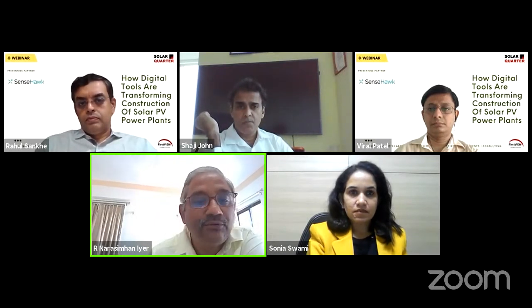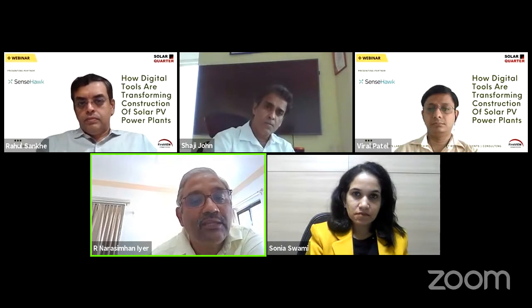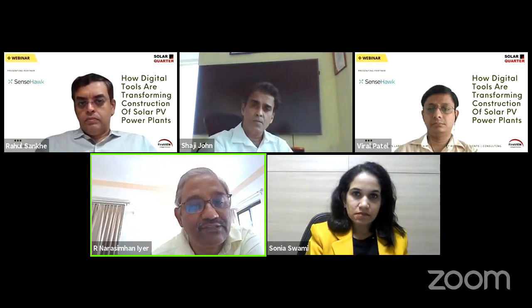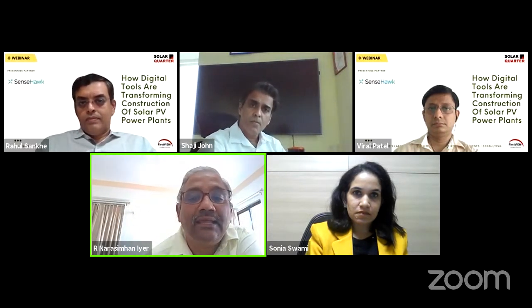And as in the auto process, if you are able to bring down the time between the day you commission to hand it over properly, you can see the plant even generate faster and add to your top line. So it's very, very important. And that's what I would say. So that's from me. And I am ready to take any other questions from my experience.